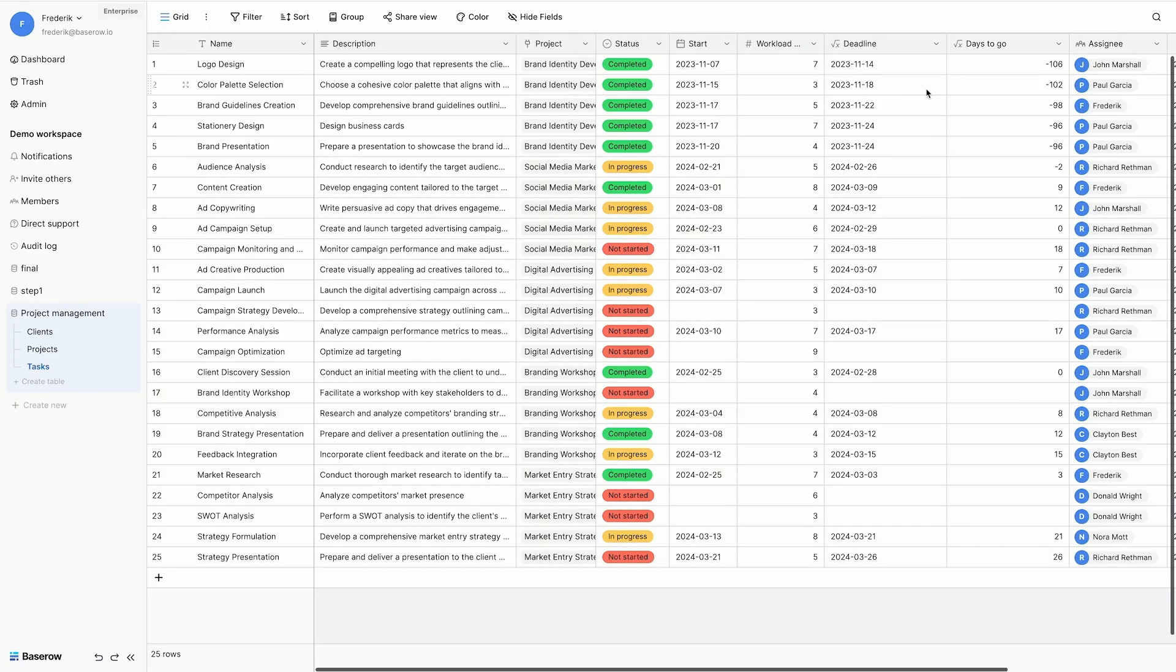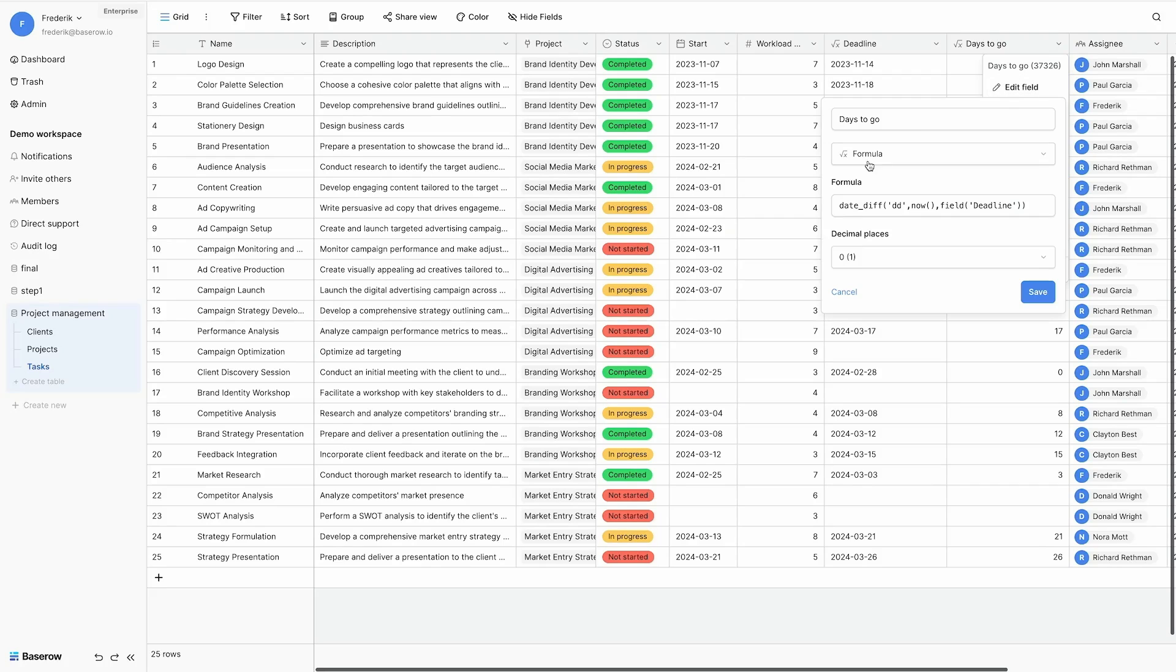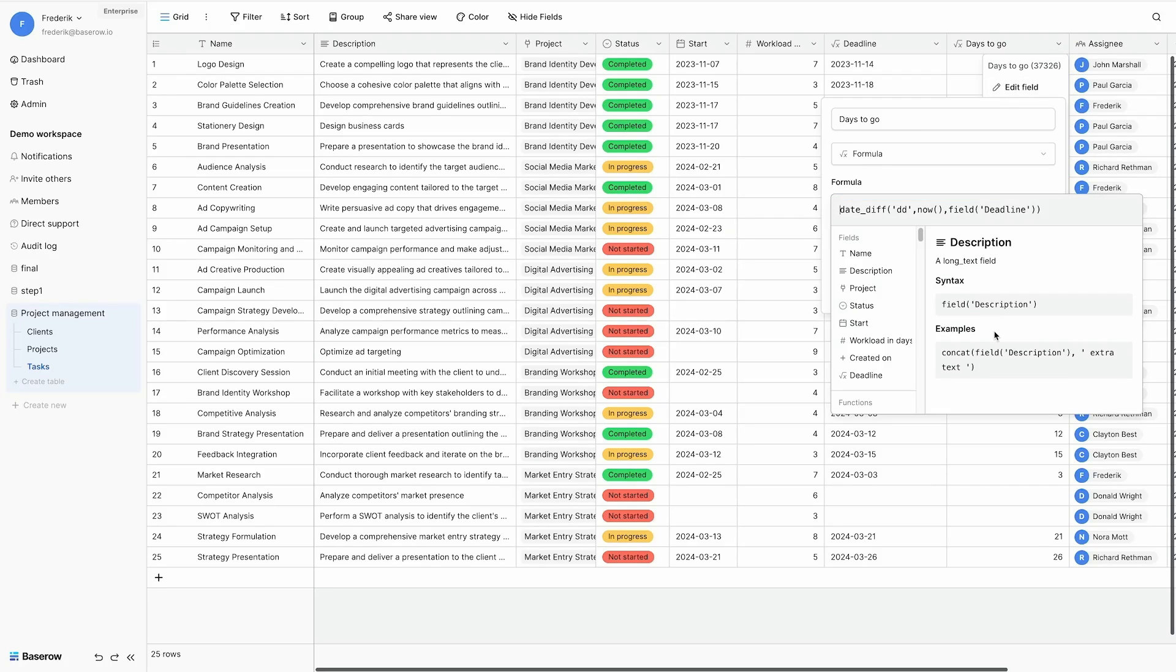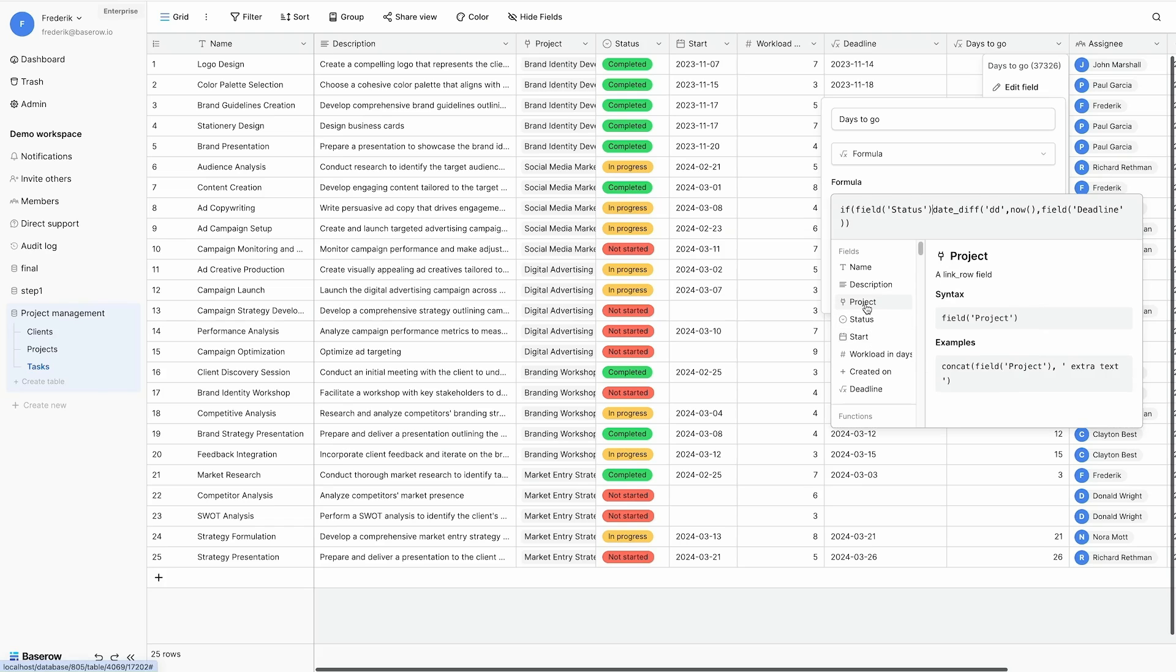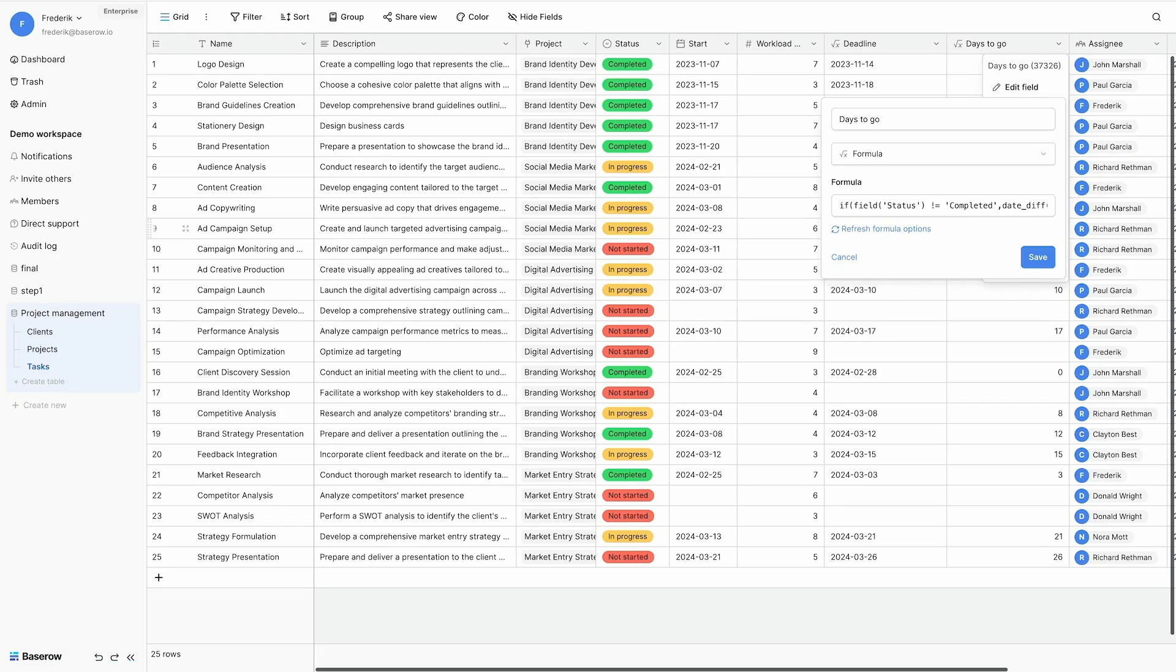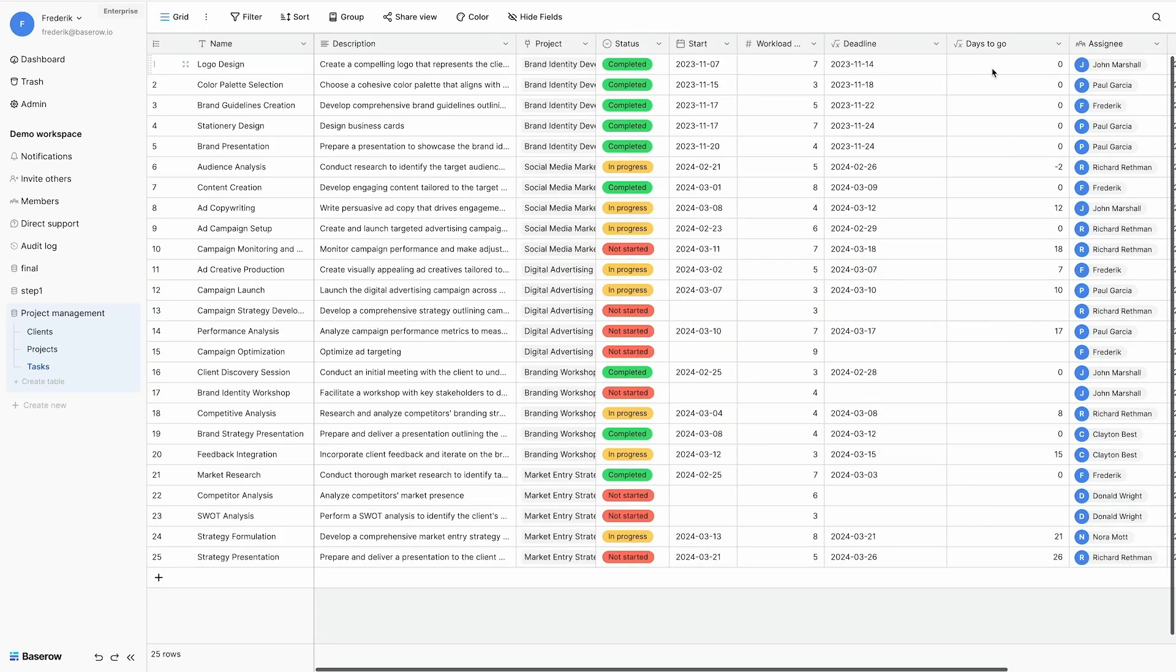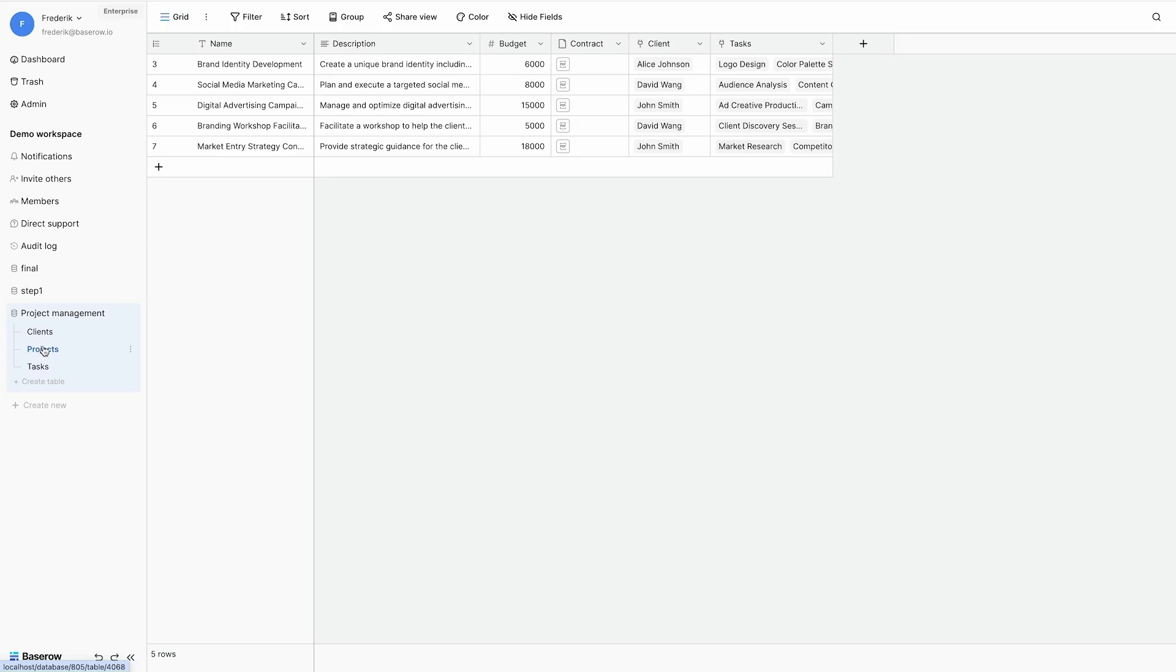Notice that it returns a lot of negative numbers. But this is for tasks that are already completed. So I build in an additional condition. If my status field is different from the text completed, well in that case I like to see the difference. In other cases just show zero. And this is solved. I still have one record with a negative number, but it's in progress.